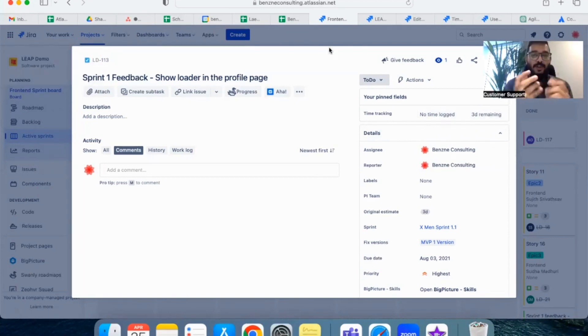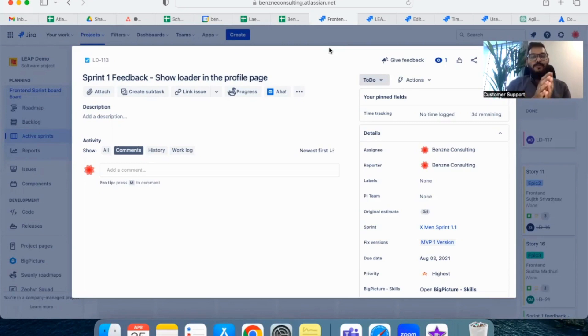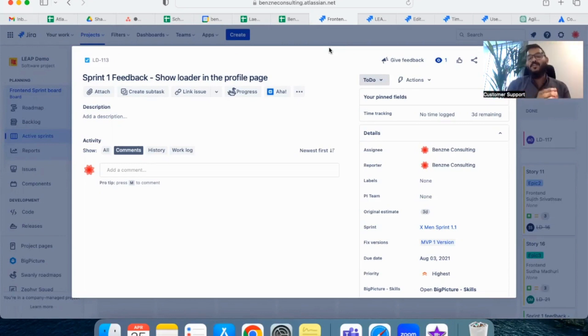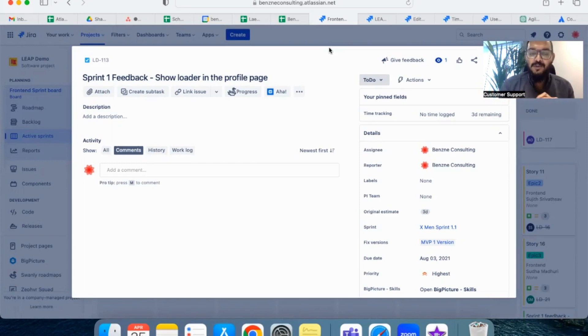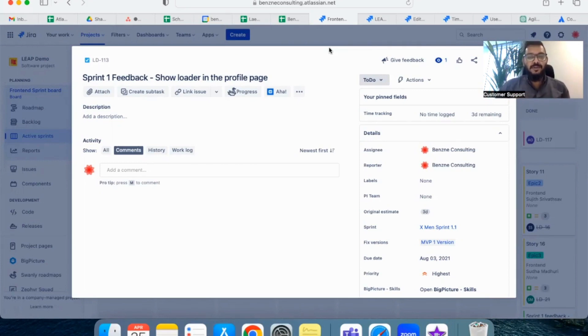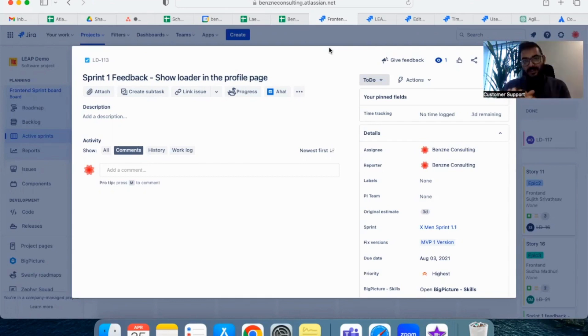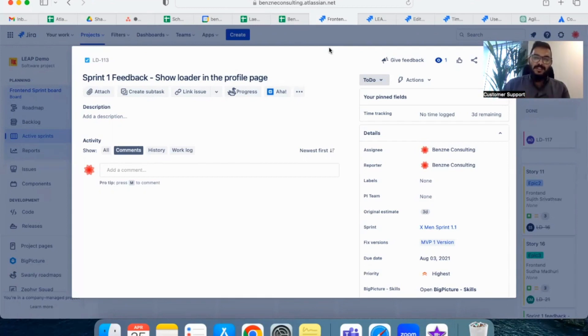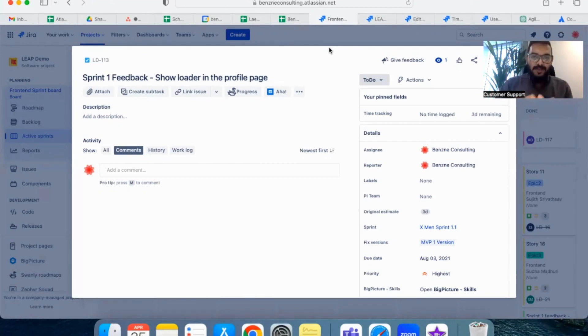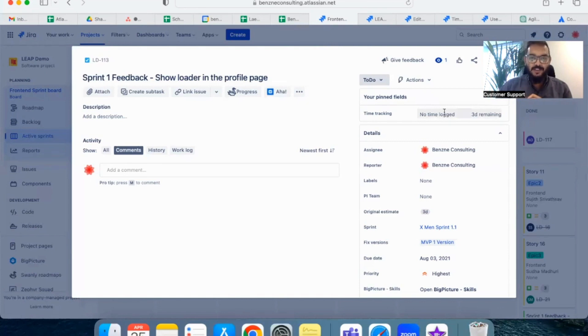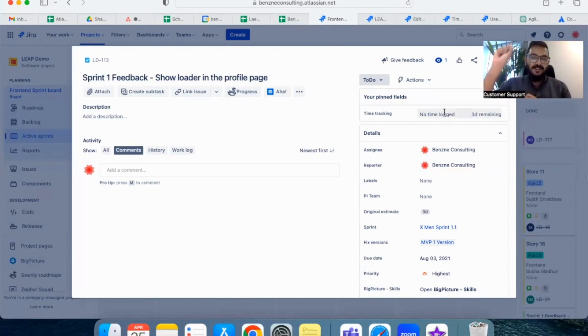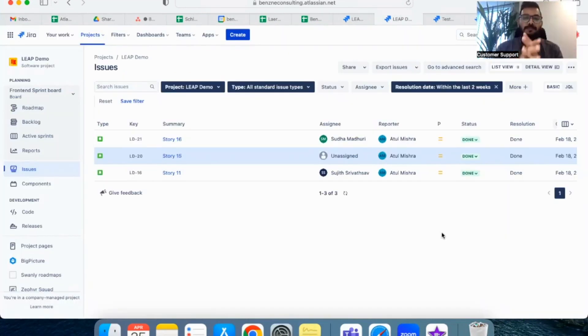So in order to fetch the report of which person has spent how much time in the sprint duration or in given time duration, it is important for any team member to follow these things. One is all the tickets should be assigned to him or her, and once the ticket is completed, he or she should enter the time spent in the time logged section before we close the ticket.